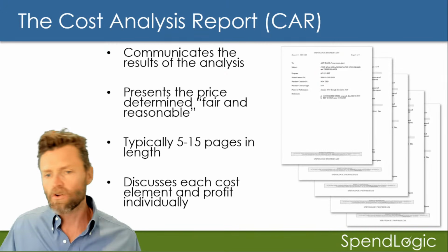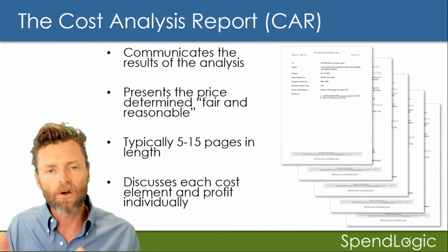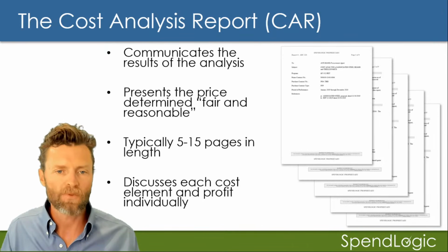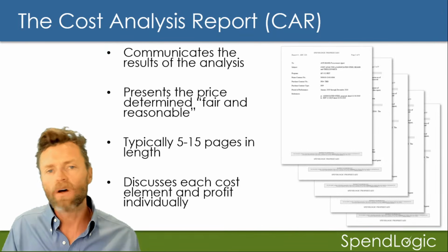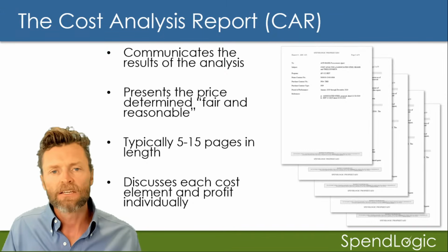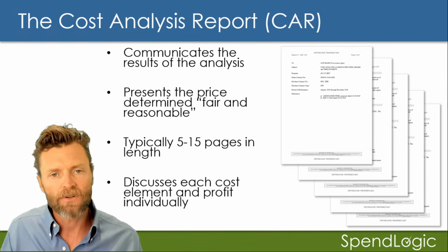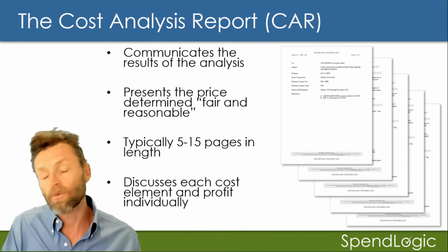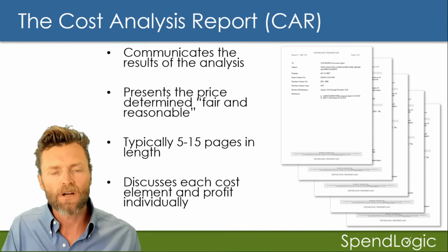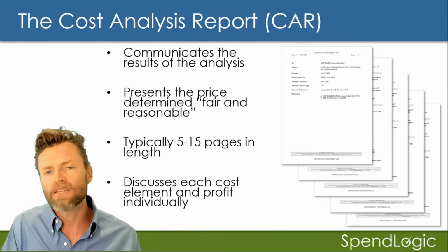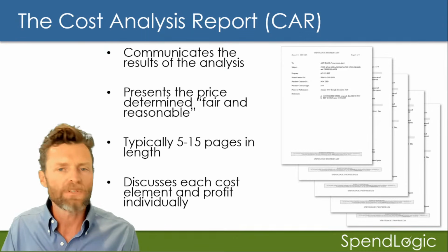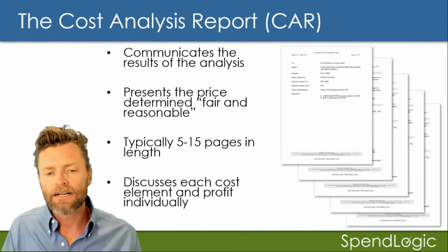So all of this, what we're going to be talking about and where we're going with this is to create a quote-unquote cost analysis report, okay? So what the cost analysis report is, it's literally a document, okay? And it's typically signed by the cost analyst, and this is sent to, or this is retained by the prime contractor. In some cases, if the prime contractor doesn't have visibility, then it would be sent directly to the contracting officer or the DCMA.